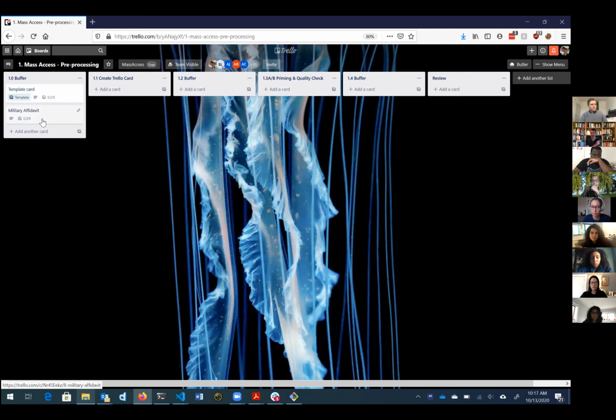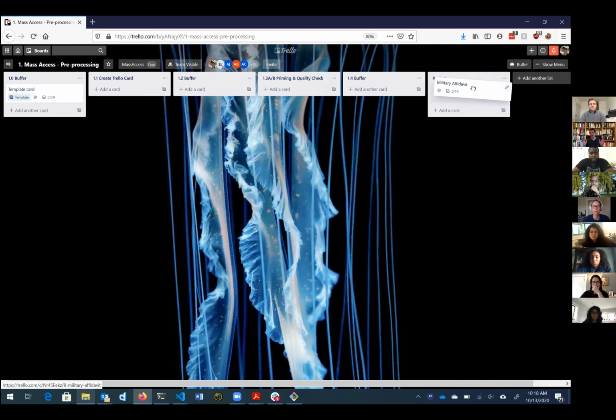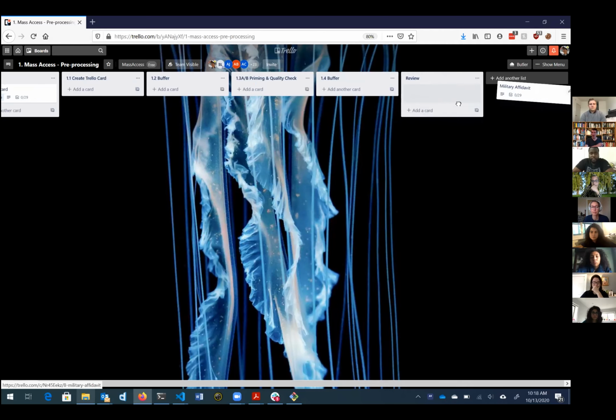And so what would happen with Kanban is you could create a list of all the things that you need to do over on one side. When you're doing them, you drag them into the job that they're being done on. And that provides a visual cue to everyone to say, hey, this is how that part's being used or what's being done. And what you would then do is you would also then limit the number of cards you could have in the verticals at any one time.